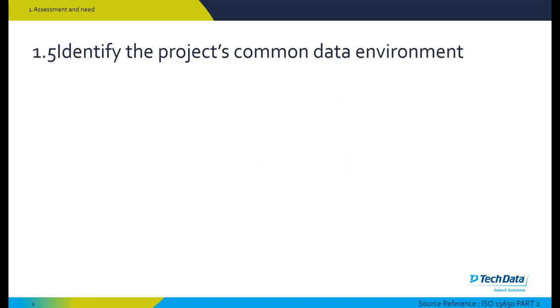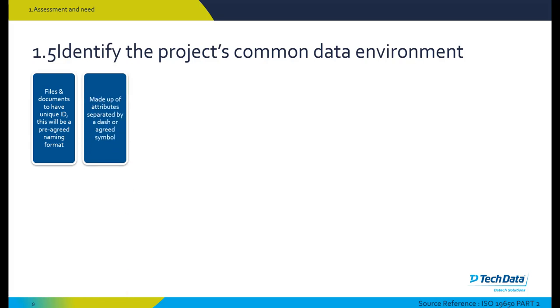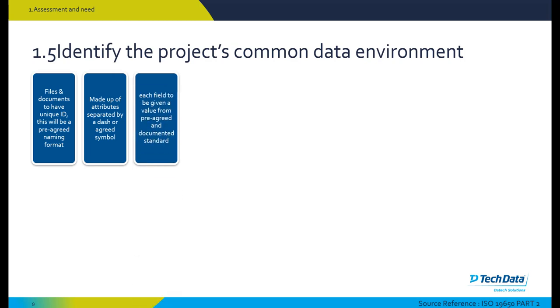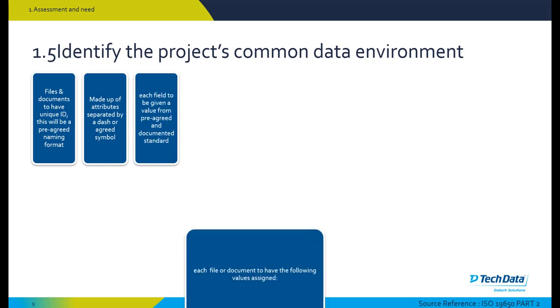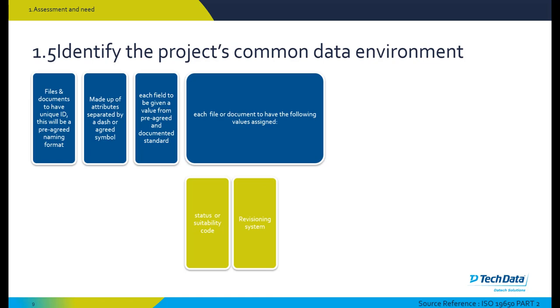The assessment and need stage identifies the project's common data environment. Looking in the context of BIM 360, this is where we need to see that BIM 360 is going to meet the requirements at the assessment and need stage. As specified in the ISO 19650 document, files and documents should have a unique ID, and this will be pre-agreed in a naming format, should be made up of attributes separated by a dash or agreed symbol. Each field to be given a value from pre-agreed and documented standard, each file or document to have the following values assigned, including status or suitability code, revisioning systems, and classification in accordance with a particular framework.